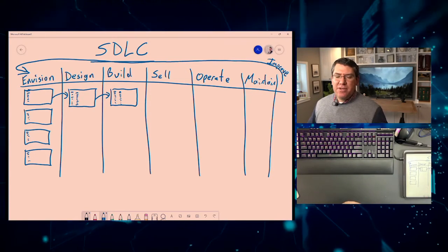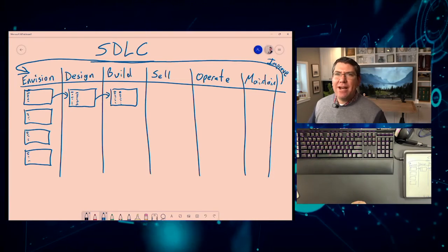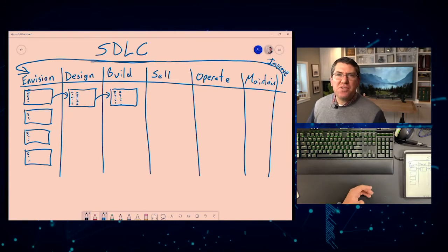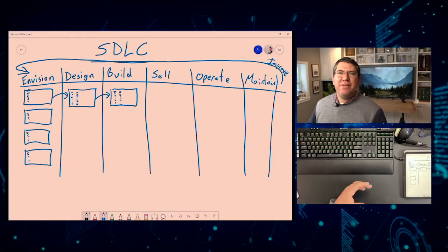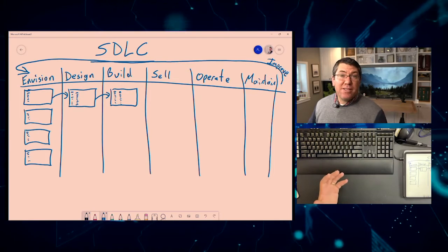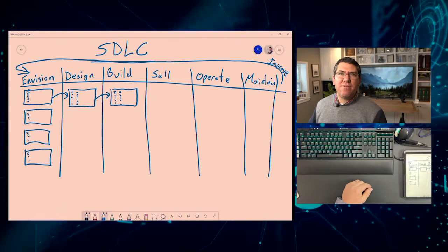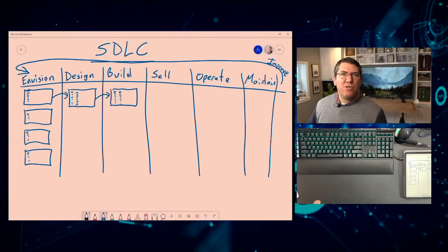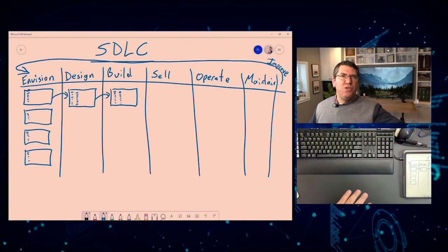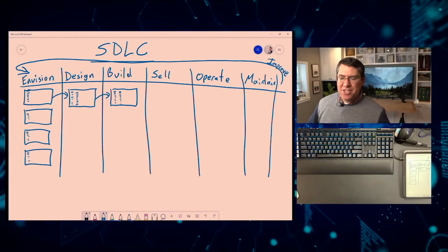And so there's oftentimes in the design a good idea to put a checklist of test scenarios so that anybody who's looking at this thing knows the bounds of the scope. Every feature has a happy path, an exception path, sometimes multiple exception paths. And if you list out the different scenarios that software feature has to support, then everybody knows when we're done, as opposed to someone running through its paces and saying, well, shouldn't it also do X? Well, those types of decisions were made when we envisioned this feature, okay?